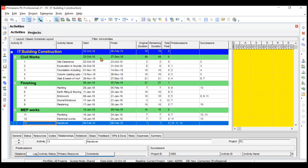Now after scheduling, these dates have been changed. Your first activity site clearance is starting on 22nd October and ending on 23rd October. Your excavation is starting on 24th October, just after completion of site clearance because it has a predecessor of the first activity. It is taking six days and completing on 31st October — since it is a six-day work week calendar, it is not counting Sunday, which is why it goes until 31st October.